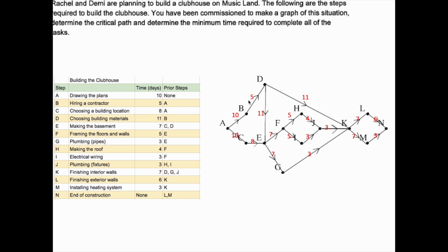We are trying to find the most expensive way through here possible. So I'm going to go from the 10 to the 5, because I can go 10, 5, 11 to get to here, which is 15 plus 11 is 26. Or I can go 10 to 8 to get to here, which is 18. I'm going to go this way.